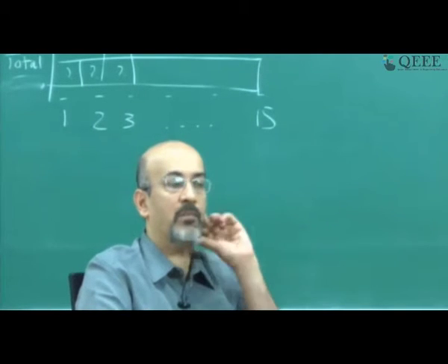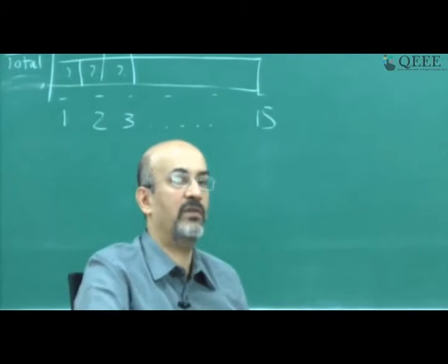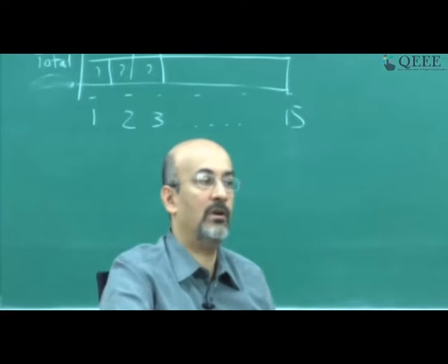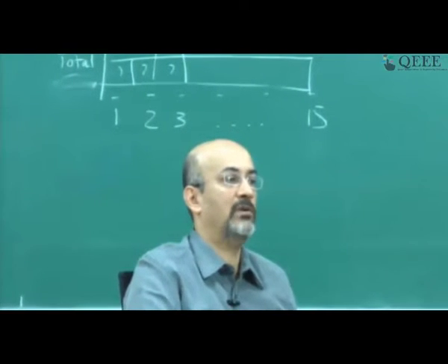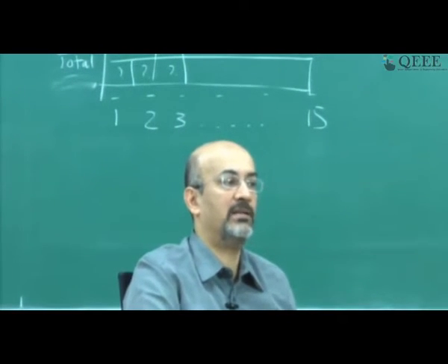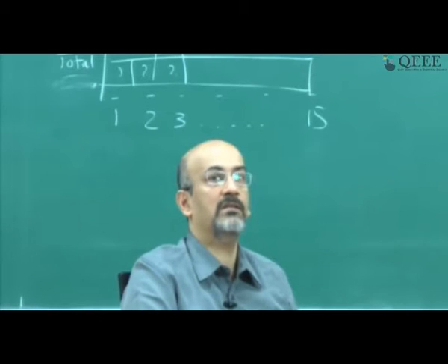Two is, this is the S curve plan. We need to actually monitor our money spending. So when we go into monitoring and control, we have to plot the actual money spent. This is the planned money spent. We have to plot the actual money spent against this planned money, and that is how I get a feel if the project is on target or not.